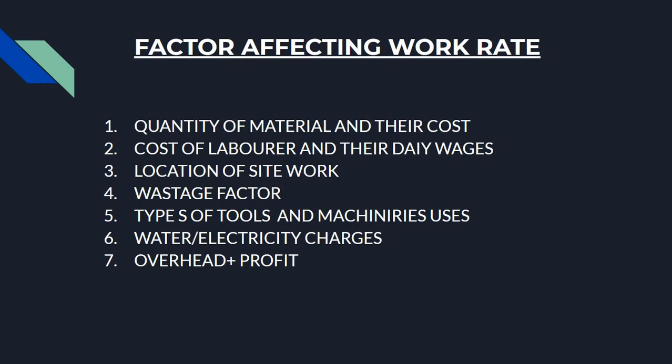Factors affecting the work rate. These seven points of rate analysis are important. First, quantity of material and their cost. Second, cost of labor and their daily budget. Third, location of site. Fourth, wastage factor. Fifth, types of tools and masonry. Sixth, water and electricity charges. Seventh, overhead power.